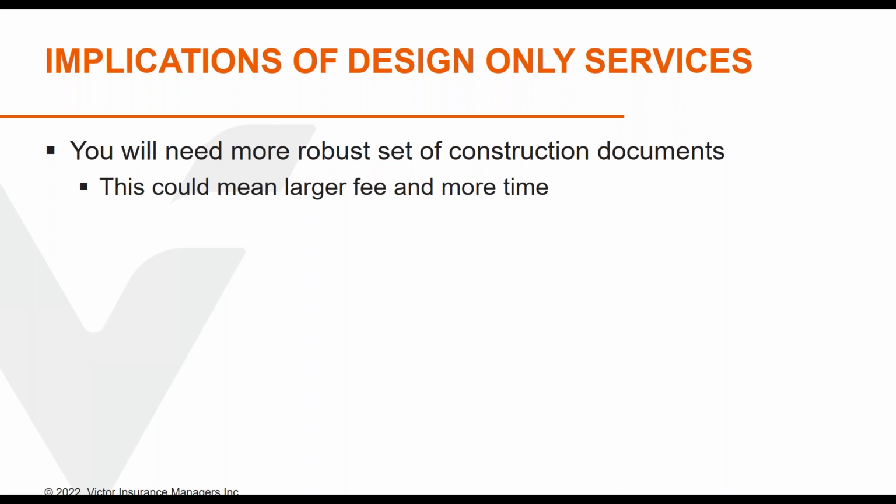Therefore, the documents that you're asking me to produce have to be more robust. They have to have more information than would be typically required. This could mean a larger fee because we have to spend more time to make sure that all of the information that the contractor needs, or more information, is reflected in the construction documents. And this could mean a larger fee and more time.